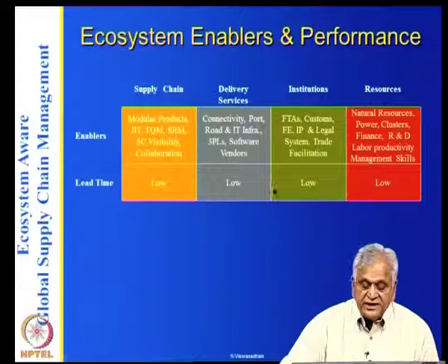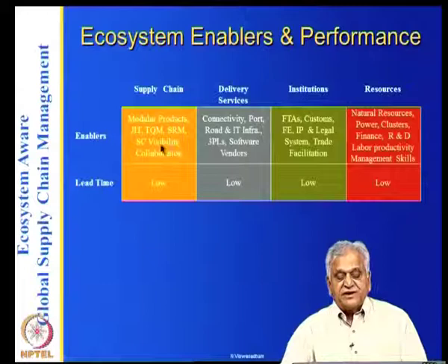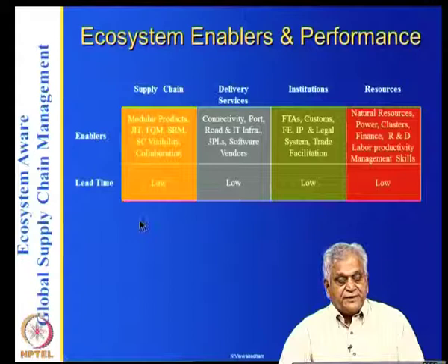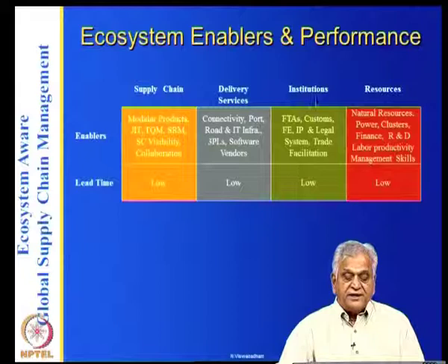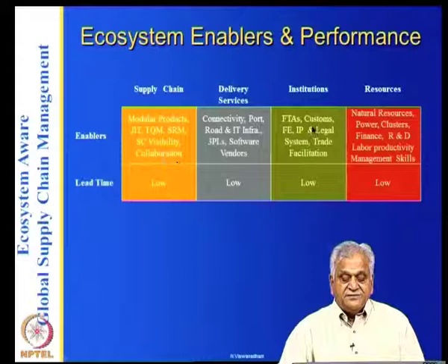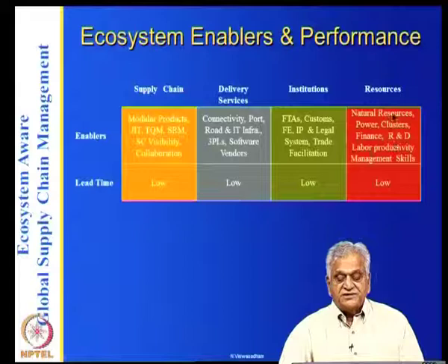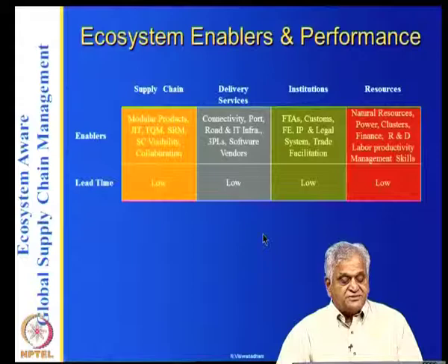Depending on the actual situation, you can have an Excel sheet, rank order them and find out what the lead time is. If you are comparing two suppliers for their lead time, depending on the countries they are in, you can get an idea of what the lead time is going to be depending on these factors. You can give scores for each of these factors for a particular country, and depending on that evaluate the supplier.